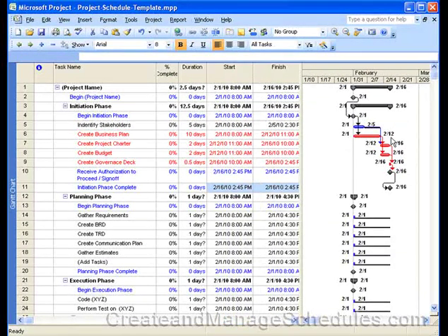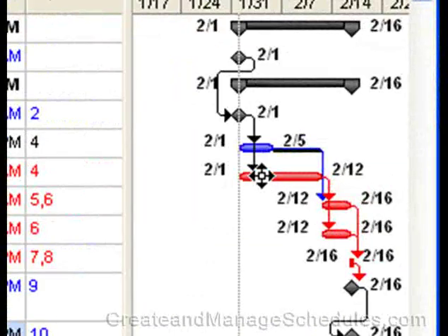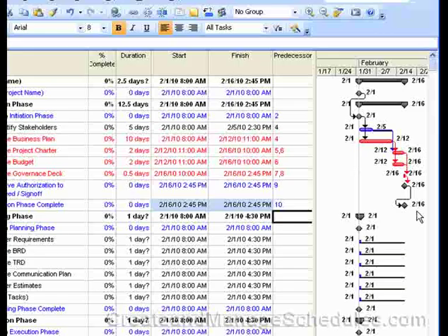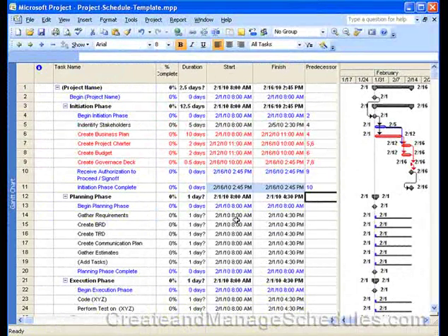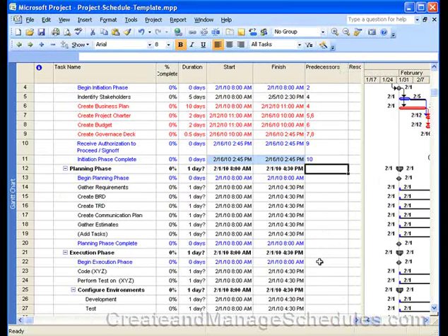And this shows you the relationship of the tasks that we've created and when they're going to start and when they're going to end. So notice that these red tasks have no slack, and the ones that are blue actually have a bar, meaning slack. Okay, and that's why they're not red. So go ahead and complete adding in the relationships between your tasks, and that's how you actually set up the initial schedule. So I'm going to go ahead and do that.